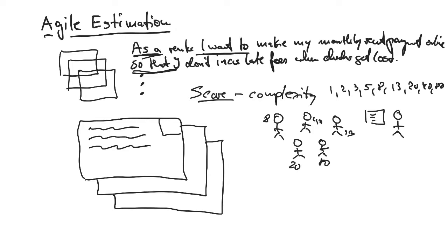They talk about it, and like with Delphi, ask the lowest estimator and the highest estimator to share their insights why one thinks it's so simple to do and one thinks it's so incredibly hard to do. Maybe they know something that everybody else does not know. And we have a discussion. Like everything else in Scrum, you time box that discussion to a few minutes. So then you ask everybody to re-estimate. They toss out their initial estimates and you ask them to make a new estimate.